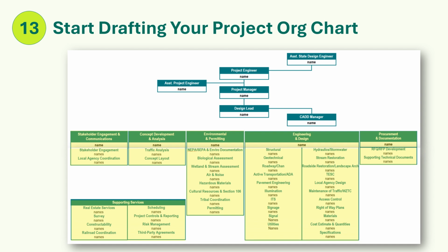Remember, this org chart helps define people's roles and project reporting structure. Larger projects may have more depth to the org structure. For example, for a large project, you may have a wall structure lead, a bridge structure lead, and a foundation structure lead. Whereas, for a smaller project, you may only have an overall structures lead. Right-size the org chart for your needs.